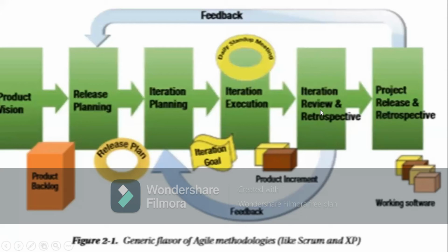So if the customer has certain pain points, those things are taken into consideration as a change request. It goes up into the iteration planning. During the iteration planning, we perform an effort sizing for those needs. First of all, we need to look at whether they have been stated in the product backlog. If yes, then we work directly on an estimation for it in the form of story points.